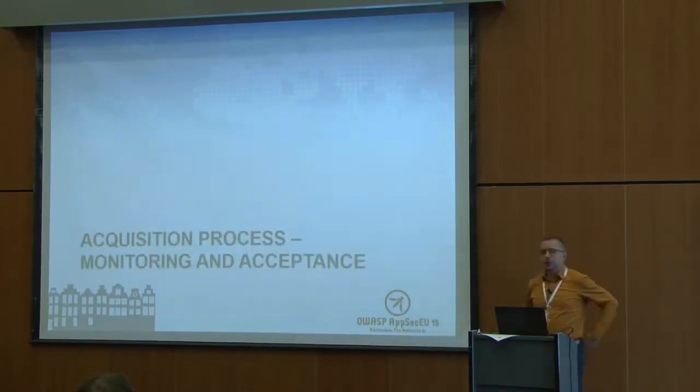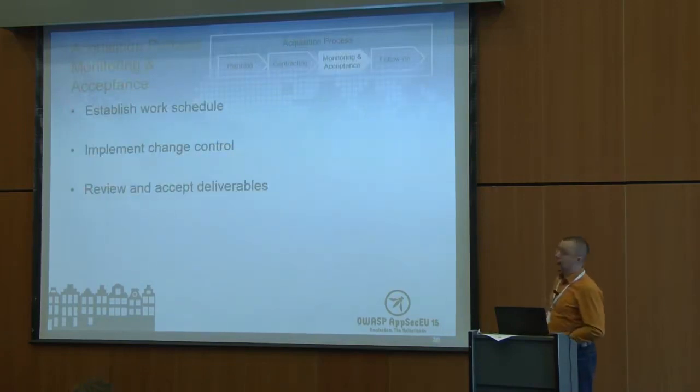Yes, so I'll cover the last two phases of the acquisition process, starting with monitoring and acceptance. So the contract is in place. The software is probably being developed right now, so we have to monitor the progress of the development. For that, we establish a work schedule to make sure things are getting done on time and there are reports being provided periodically. We also implement some change control and review and eventually accept the deliverables.